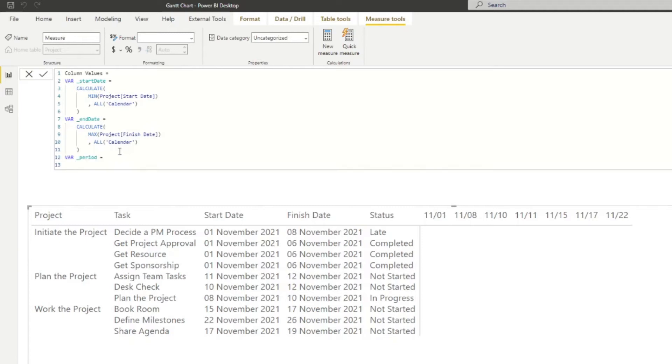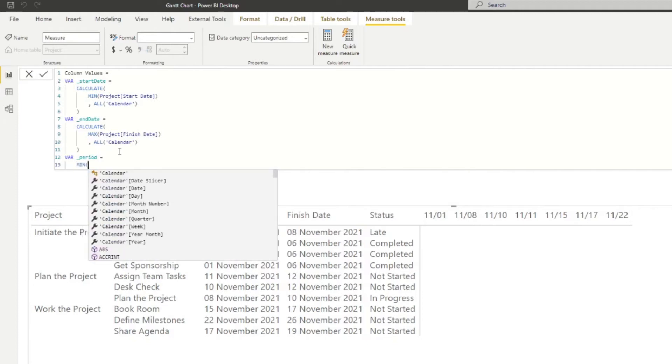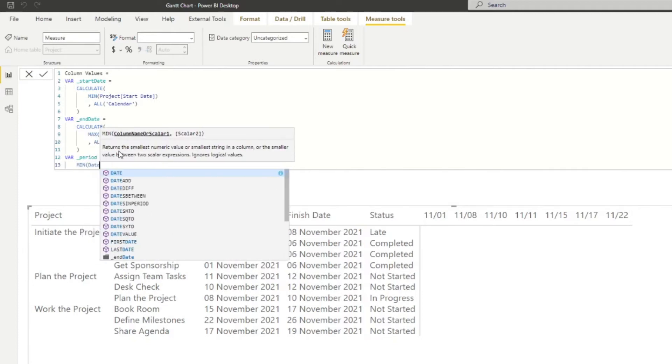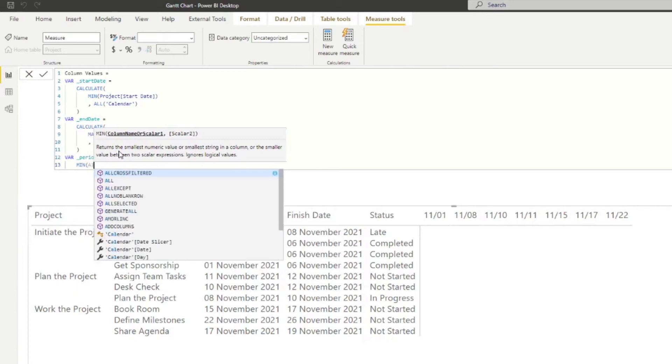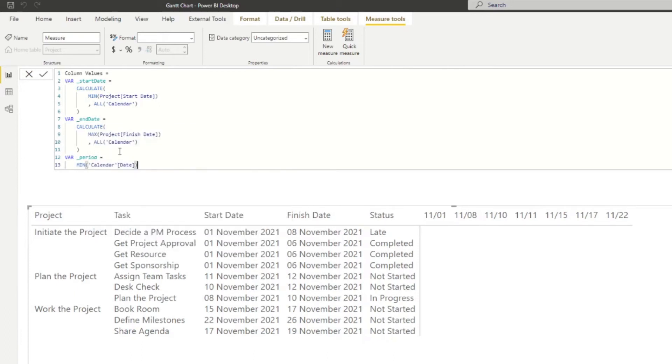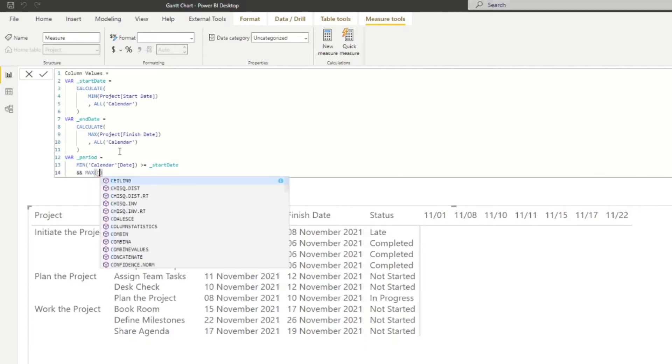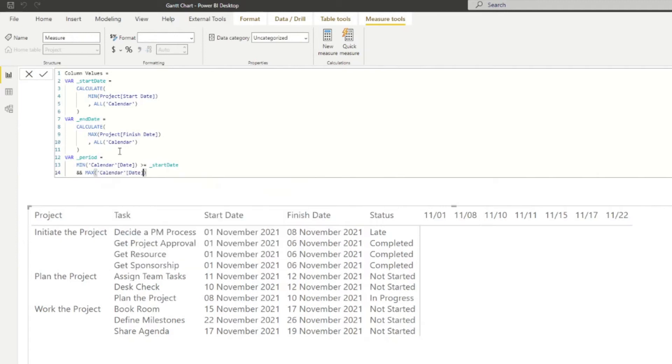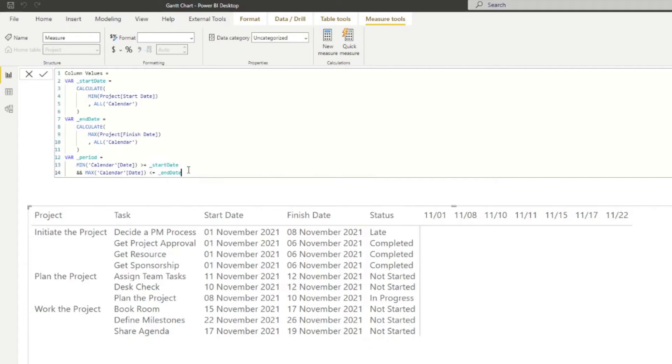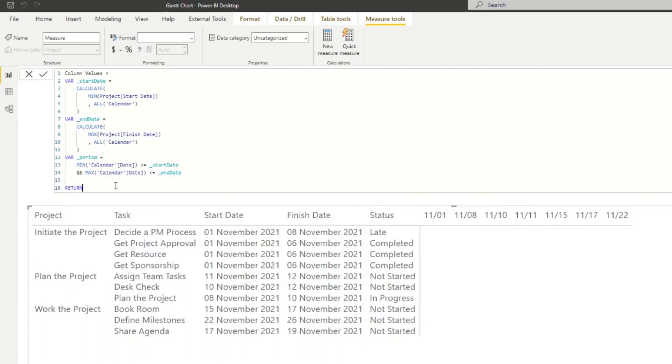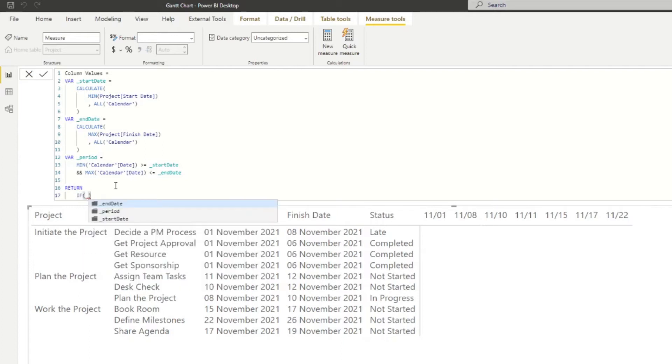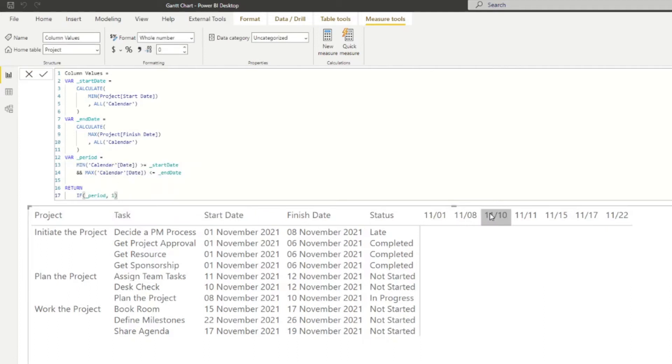So here we're going to do end date. And then instead of min, we're going to do max. So that will give us the opposite part. And then this one, we need to make sure we are pointing on the finish date. So let me just do this finish date. Here we go. So now that we've done that, we'll now create the variable period, which is what will determine the start dates and the end date for each of the tasks. So we're going to write here minimum for the calendar dates. So in the range that we have there is it has to be greater than or equal to the end date. So now that we have that, we simply just return this value. So now we have the value to say this, if this is within a period, what do we do? So we're going to add an if statement here to say, if period is true, then give me a one. So we'll keep it like that for now.